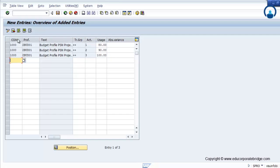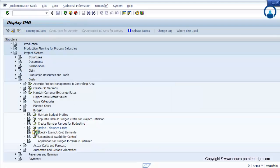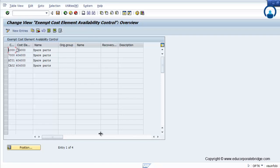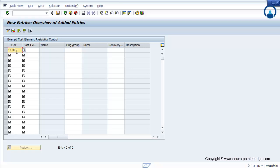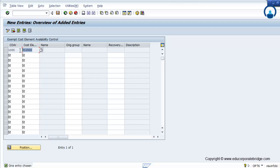These are the tolerance limits set against this budget profile. Now, particularly for cost elements: all budget values or cost values in the project system module flow with the cost element. So the cost element will manage the flow of cost in the project system module. If a specific cost element needs to be removed or exempted from the budget check, you have to maintain that here — for example, for a particular 1000 controlling area, if you don't want to check the budget on a particular cost element, you set it here and save.